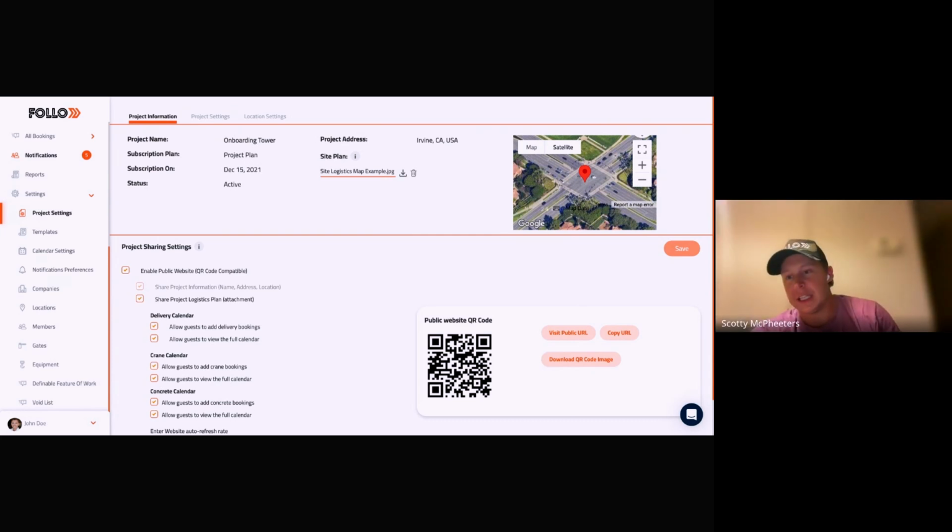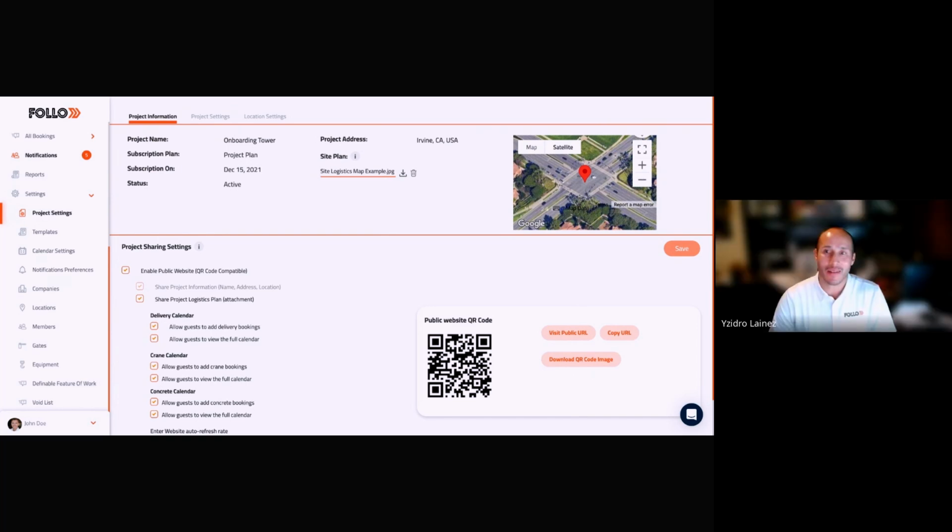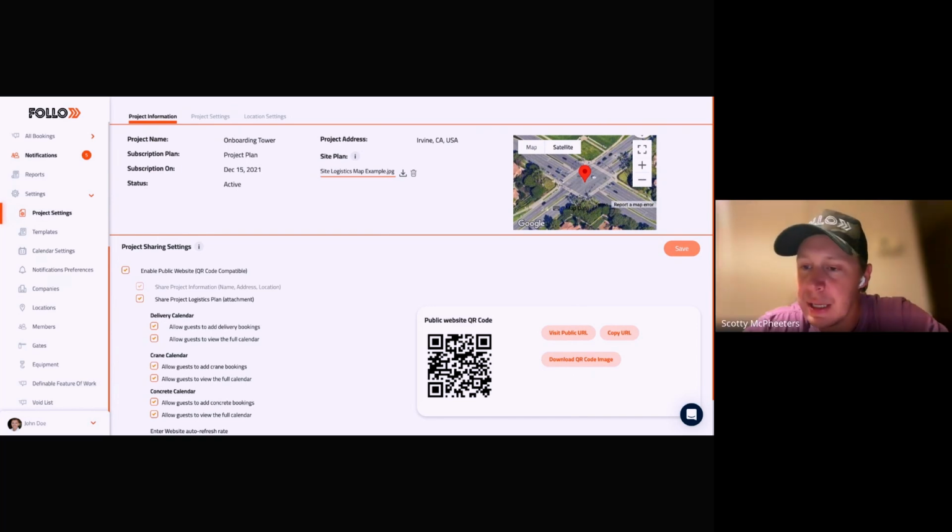Less fighting. You're stacking everything through at the right times with the right stuff, and your crane operator can be in here approving things too, right? If he's going to be on a roll, you're not going to stop him. You might have a time on a project where the steel contractor has a tower crane a couple of days a week from 10 to 2, and the only time other guys can get picks is from 7 to 10 in the morning, or 1 hour in the afternoon.